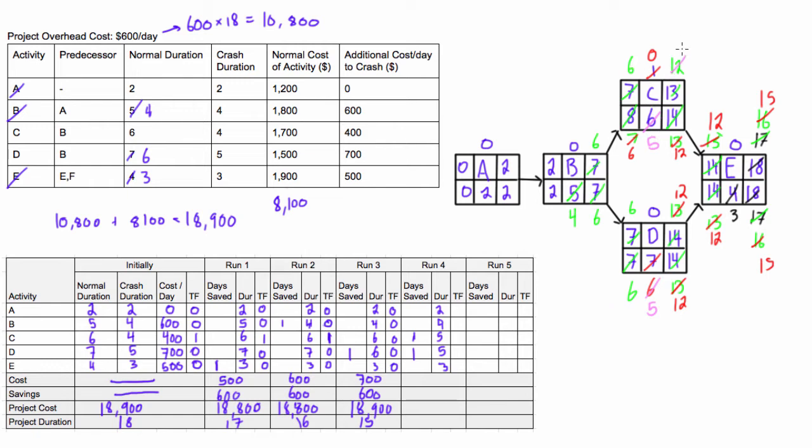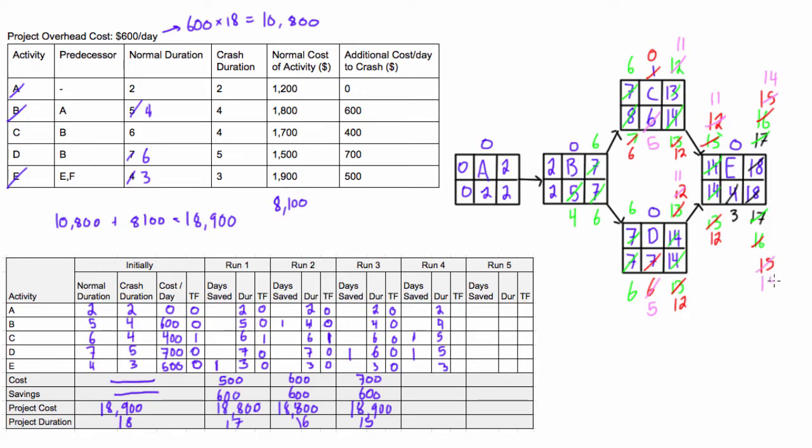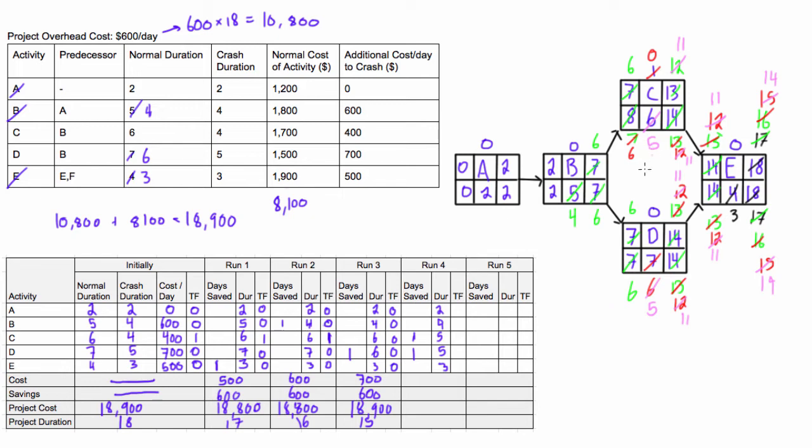Okay. So 6 plus 5, we get 11. 6 plus 5, we get 11 there as well. Okay. So we're definitely bringing an 11 into here. And then 11 plus 3, we're knocking that right down to 14 days. Bring that to the late finish. So we get 14. 14 minus 3, we'll get 11. So we have to bring back that 11 into these positions. And now we're really running out of space. And we have 11 minus 5, which will give us 6. And 11 minus 5, which will give us 6. Again, that should make sense by now.